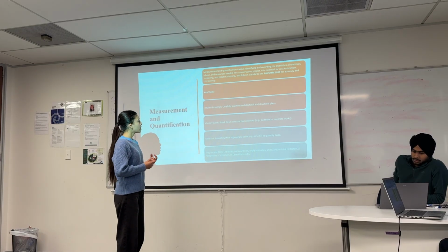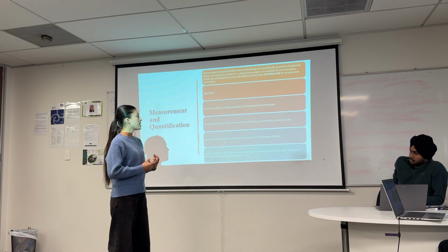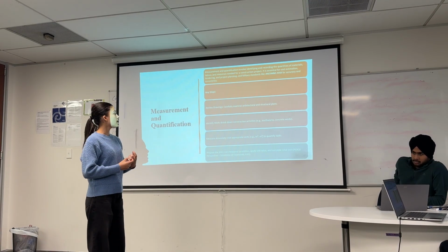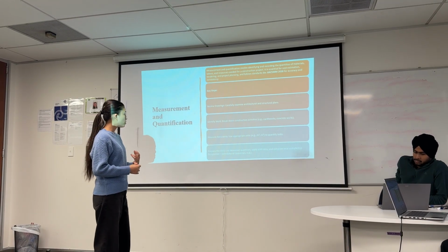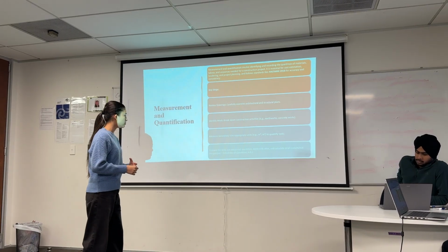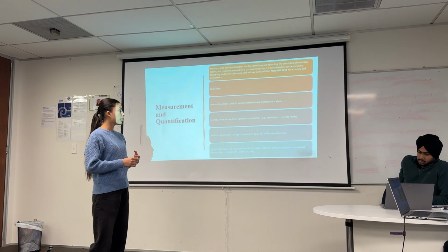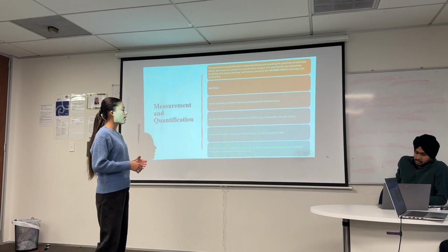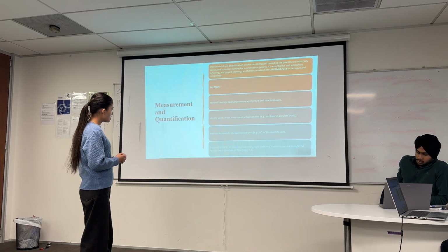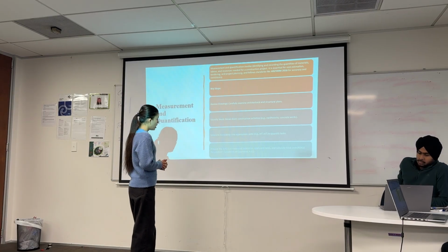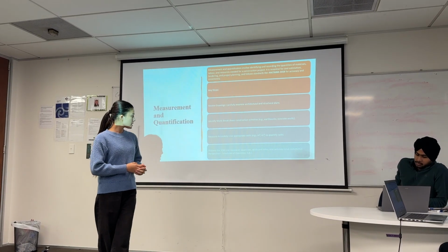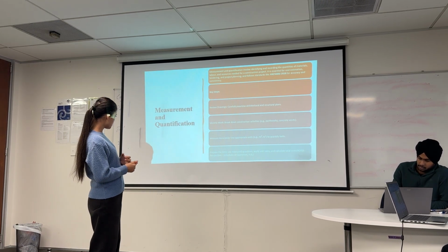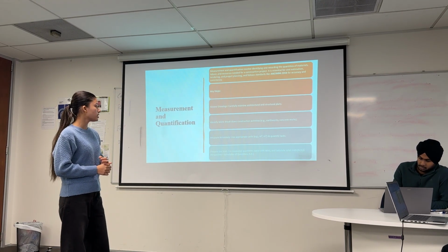Review drawings. Carefully examine architectural and structural plans. Identify works, break down construction activities like earthwork and construction works. Third one is measure accurately. Use appropriate units like square meter, cubic meter to quantify tasks. Fourth one is prepare the SOQ. List major quantities, apply unit rates, and calculate total cost, and prepare the schedule of quantities.